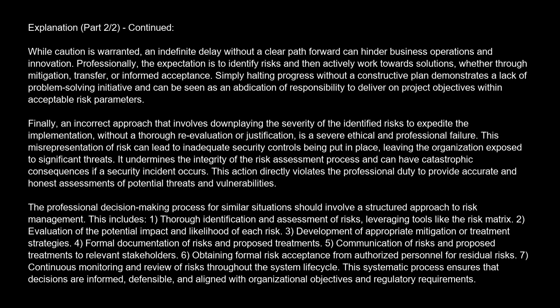The professional decision-making process for similar situations should involve a structured approach to risk management. This includes: 1. Thorough identification and assessment of risks, leveraging tools like the risk matrix. 2. Evaluation of the potential impact and likelihood of each risk. 3. Development of appropriate mitigation or treatment strategies. 4.